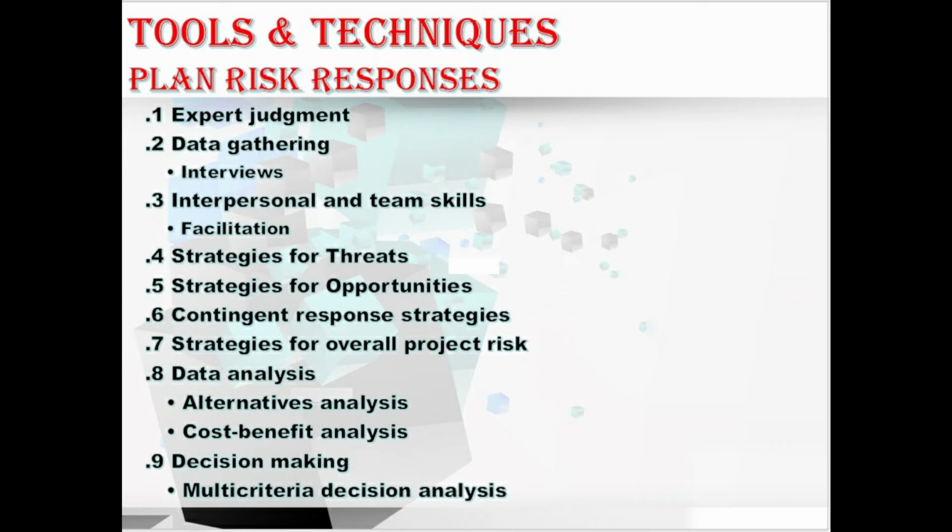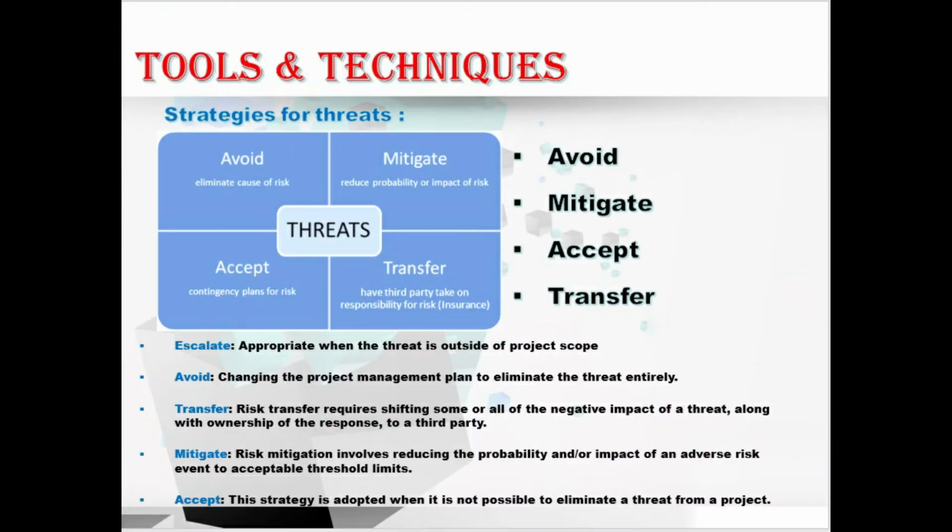We have strategies for threats. We have 5 alternative strategies that may be considered for dealing with the threats. We have escalate, avoid, transfer, mitigate, and accept. Let me explain one by one. First, escalate. This is appropriate when the threat is outside of the project scope.